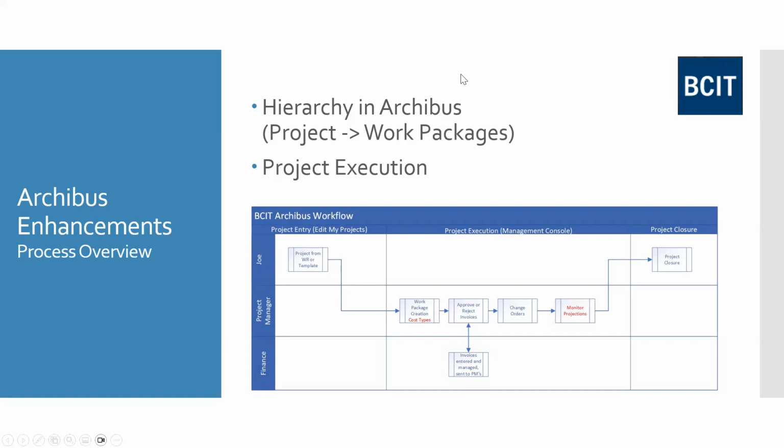In the Archibus world, just to keep it simple, a project is made up of work packages. Work packages have contract dollar amounts associated with them. Once you have a work package set up with a contract, you have invoices that go against that. You have change orders that are also applied to that.